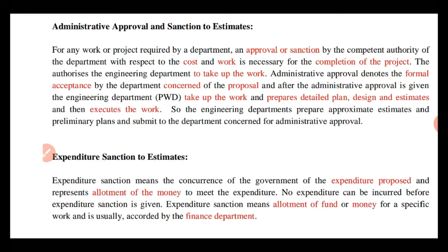Administrative approval is the formal acceptance by the department concerned of the proposal. After the administrative approval is given, the engineering department takes up the work and prepares detail plan, design, and estimate, and then executes the work. The engineering department prepares an approximate estimate and preliminary plans and submits them to the department concerned for administrative approval.